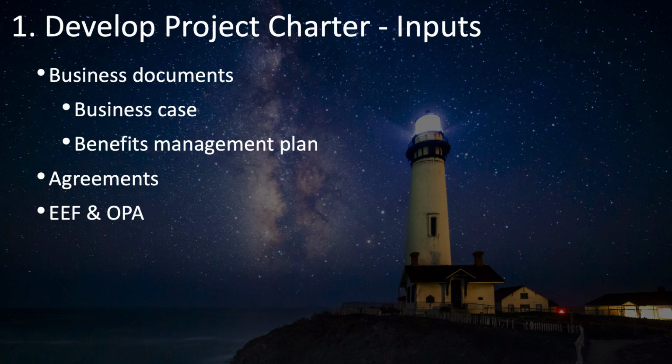Notice that the needs assessment is not included here. This could be in part because the needs assessment is summarized in the business case. However, if you need to take a closer look at the needs assessment, that could certainly be an input. Remember that these lists in the PMBOK guide are not all-inclusive lists. They're guidelines of things that are most commonly used as inputs, but not rules about what must or can't be on the list.